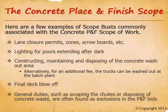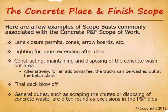Many of the general duties associated with place-and-finish activities are excluded in their bids — these might include scraping the concrete truck chutes or disposing of concrete waste. Do not accept these exclusions. Furthermore, a common problem is that general contractor superintendents will use two or three of their laborers to help out a concrete place-and-finish sub during a hectic concrete pour — this is not a good practice. The general contractor's laborers should not be directed towards work performed by subcontractors. Regardless of how hectic a concrete pour may be, the general contractor's laborers should not assist the place-and-finish subcontractor unless it's an emergency — and in that emergency, the place-and-finish subcontractor needs to be backcharged for that work.